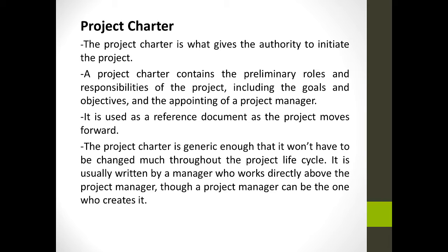The project charter is generic enough that it won't have to be changed much throughout the project life cycle. It is usually written by a manager who works directly above the project manager, though the project manager can be the one who creates it.